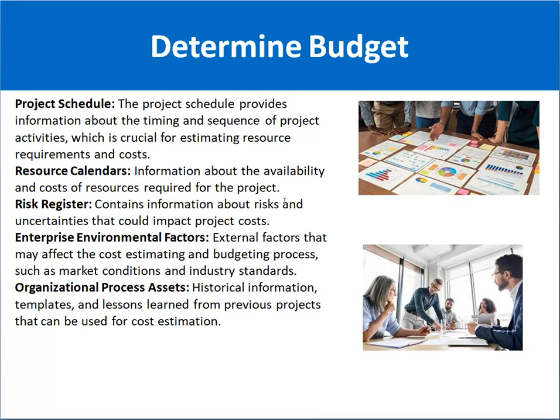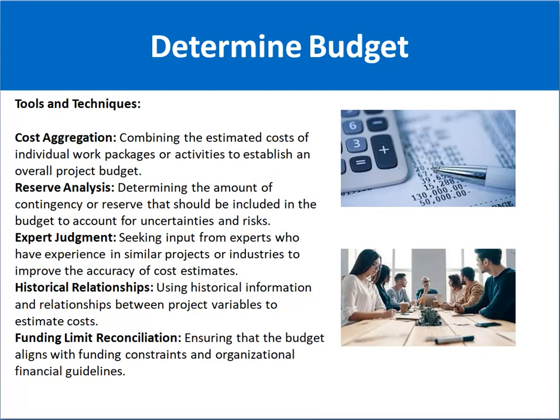Friends, the tools and techniques are, first one is cost aggregation, which basically combines the estimated cost of the individual work packages or activities to establish an overall project budget.